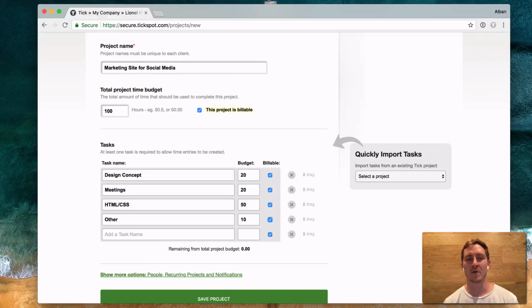So we try to shoot for between maybe 4 and 10 tasks. If you get really in depth with hundreds of tasks, which it's not uncommon for me to see people set things up that way, when you do have tons of tasks, it gets kind of confusing for people on where to put time. So I've seen it where people will set up emails with clients, but also client communications, and then they'll have another one called replies to inquiries. And if you had someone who's replying to an email from a client that's also an inquiry, they could put in one of each of those buckets.